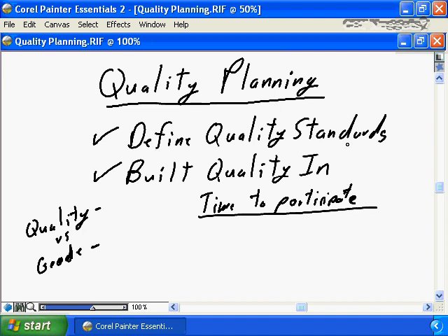You need to understand what the quality standards are going to be, what the business's expectations for quality versus grade are going to be, and then you need, and I would like to re-emphasize this, you need to build the quality into your project plan to ensure there is time, there are tasks in the plan that the team members can use, that they have relief from other project delivery responsibilities to participate in the quality activities that are defined for your project to ensure, again, that your final product is delivering to the quality expectations for the project.